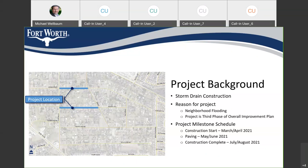The paving portion of the project that everybody is very interested in should happen in May through June. They're going to do the streets one at a time, so the paving will last a little bit longer. They're going to start with North Hill and then go on to Greenfield to complete the paving. The construction project should be done in July, or possibly into August of this year, but by August we should pretty well be wrapping up this project. It'll go pretty quick once we get started.